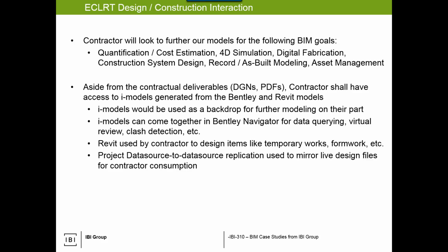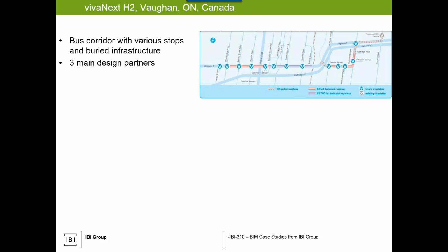So that last bullet there, just to make awareness, because we're using ProjectWise, we're actually able to automate a turnover mechanism, if you will. So essentially, everybody works all day long, and then the system sees what's changed and delivers it to the contractor. So every single morning, the contractor gets an updated version of all of the CAD files, all of the BIM, everything. And that's alleviated us from that, but it built in the liability now, I don't know if that's the right word, but it built in the requirement for us to now be cognizant of the fact that they have all of the current content, whether it's in design, whether it's decided upon, whether it's rubbish and you're in the middle of redesigning it, it just doesn't matter.